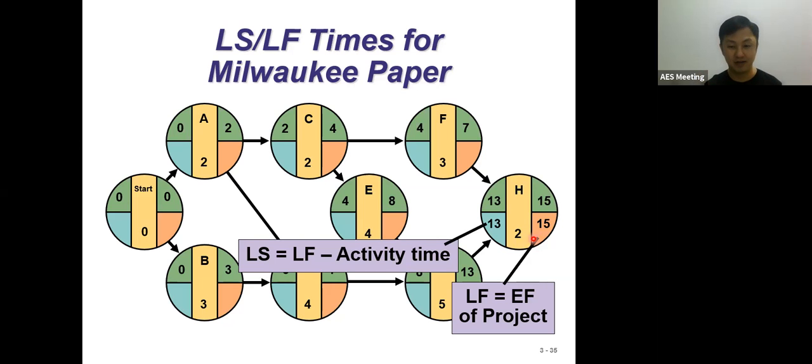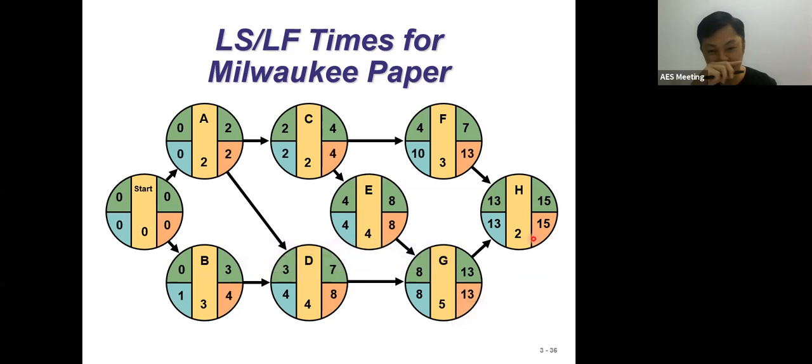So I'll show you the examples here, so we have all the answers. Based on activity H, 30, this 30 will go to G as 30, and to F as 13 also. So how do we calculate? 13 minus 3, you get 10. Same thing, 13 minus 5, you get 8. I think it's quite clear on this side, the bottom part.